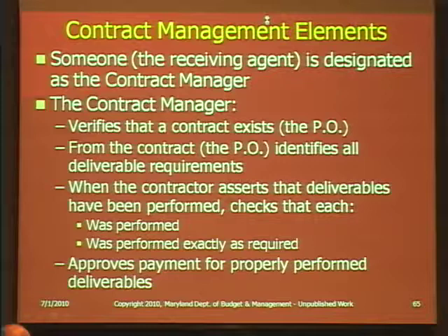Using the contract as the source document, what are the deliverables? What is it that is supposed to be provided by the contractor? So you have to ascertain those. When the contractor says that he or she has completed the deliverables, one of them, some of them, all of them, then they're going to come to the state and they're going to want payment.